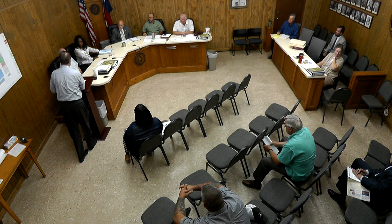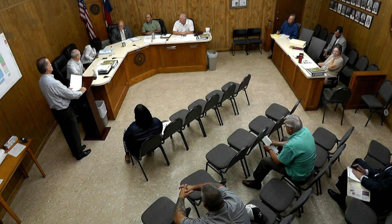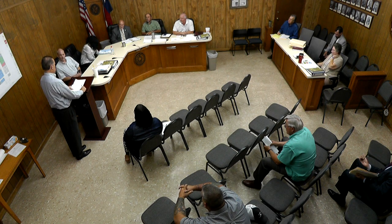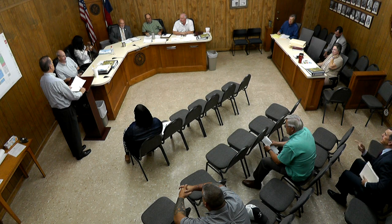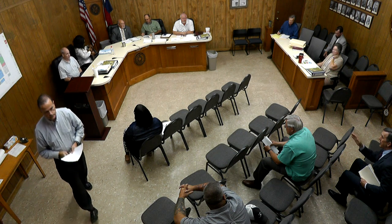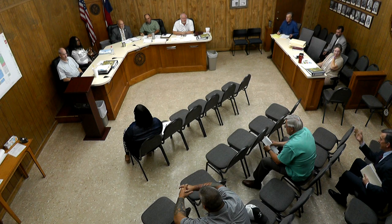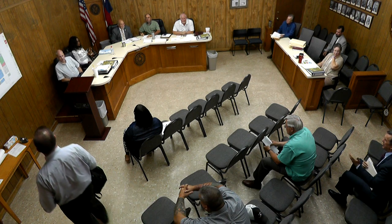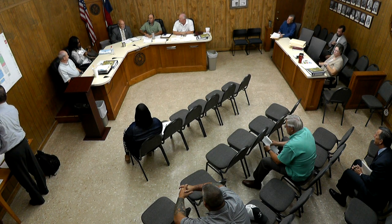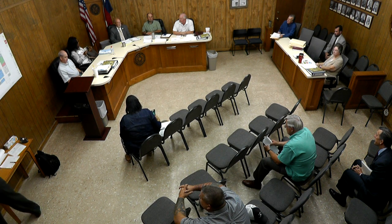Thank you for being patient with us. Thank you. Commissioners, anything else at this point? Michael? I'm good. I'll get back with some revised drawings and touch base with Commissioner Mill. I'll get your cost estimates on 2.5 to 5 million. Probably about 90 days, Commissioner Walker, from when you think you're going to need the money, and that provides time for notice in the paper and all that. About 90 days to start the process. But we would certainly use our capital that we have first before we go borrow money. I would think.